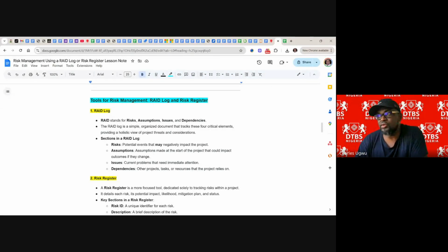If anything happens to our own CRM project, the marketers building their own marketing funnel or lead funnel, building pipes, you see that they are stuck. They can't continue because their project is depending on us. If we successfully deliver, that is where they will have chances. If our project is delayed, theirs will be delayed. That's what we call dependencies.